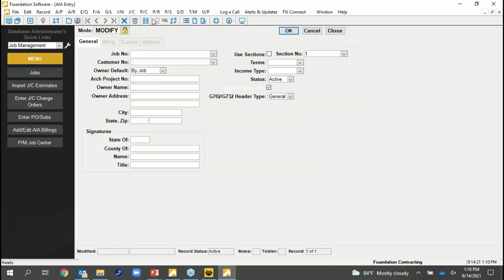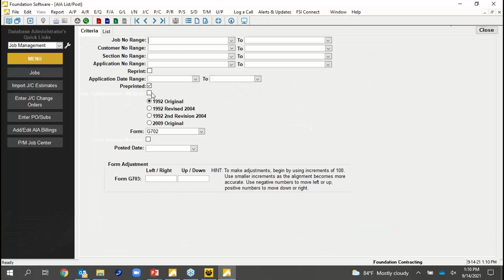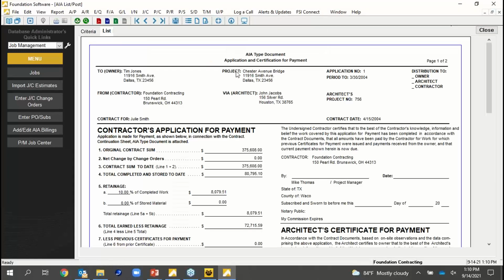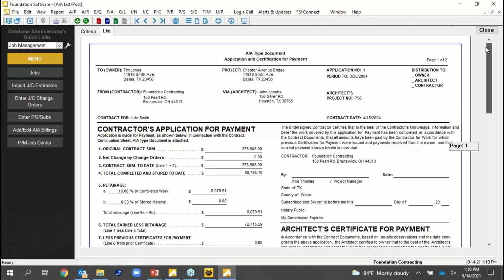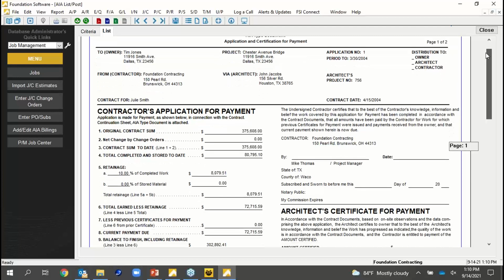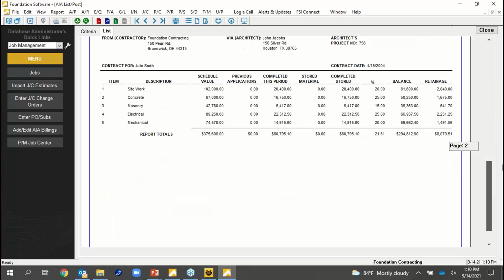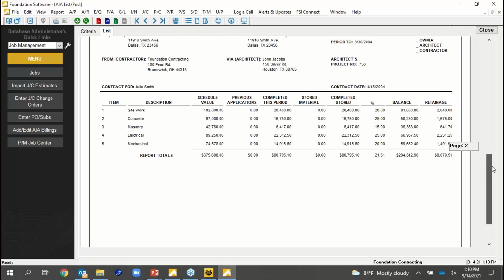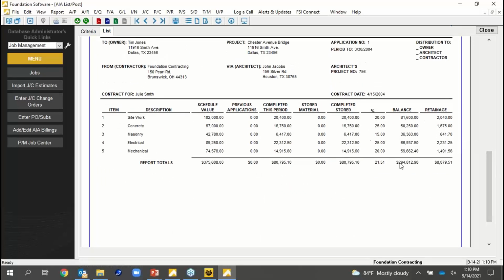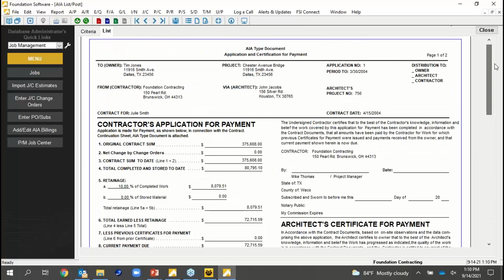Well, we just filled some of the percentages in, and now we can, of course, produce the actual AIA form. Now, there's other options for the display or output of that billing. For just standard contract invoices, some T&M billings, you have a form designer. We do preload various templates, but this is more of the standard AIA type format. Our G702, our G703, our schedule. There's those percentages.